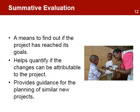The summative evaluation occurs at the end of the implementation. It is a means to find out if the project has reached its goal, helps quantify the changes that can be attributed to the project, and provides guidance for the planning of similar new projects. Summative evaluations focus on results and the effectiveness of the project to deliver the intended benefits, using information from the formative evaluations and the monitoring system.